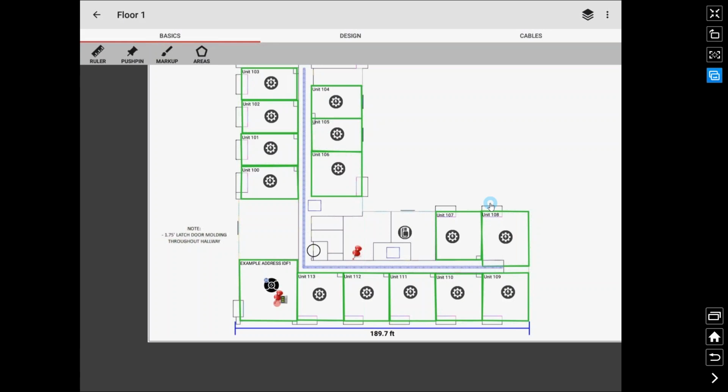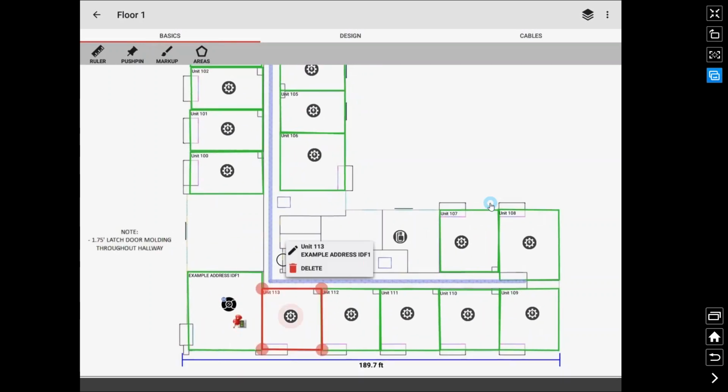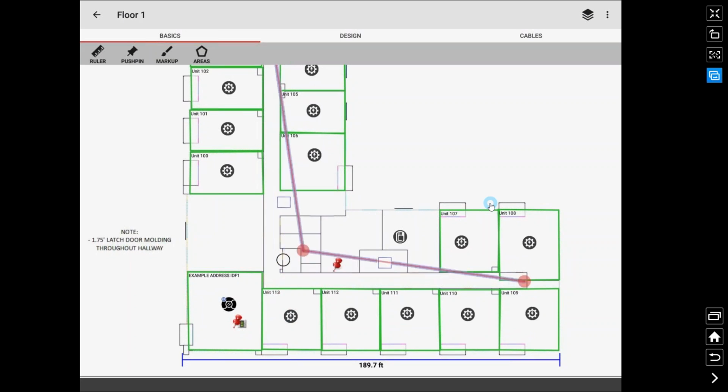And one of the key benefits of having a digital solution is you could start the engagement process from the very early phases. So I'm at the venue, I did a preliminary design. Why not go show this to property management right away, get their feedback on it, have them engaged in that process so it doesn't lead to any delays later on. So get them engaged. If they don't like something about your solution, a key benefit is we can make adjustments directly there, have them involved. I could make changes. If they don't like one specific routing, I could change my routing and really have them involved in that process.